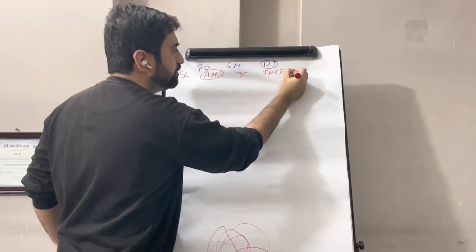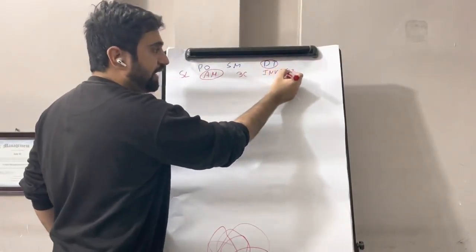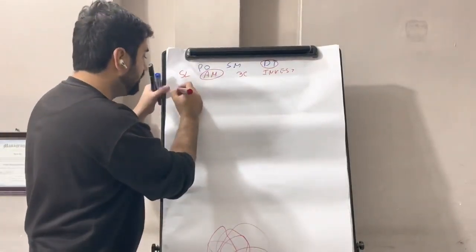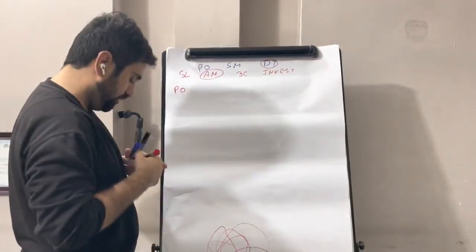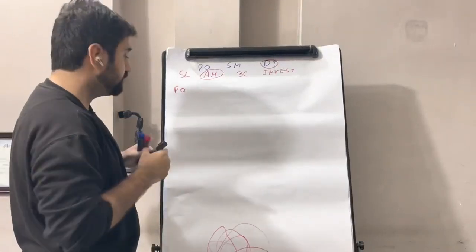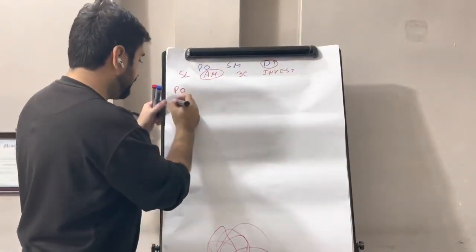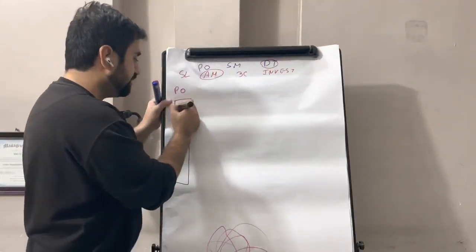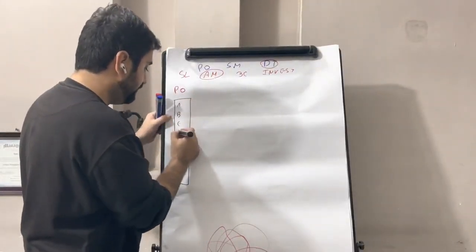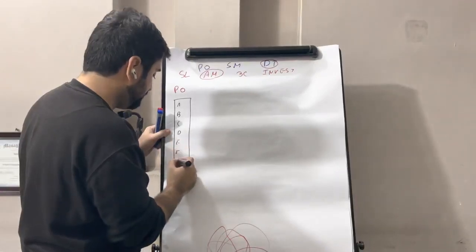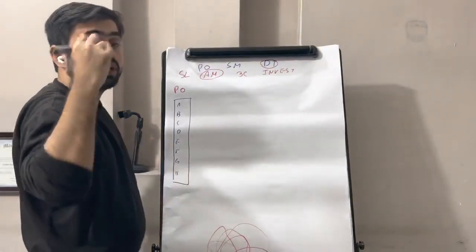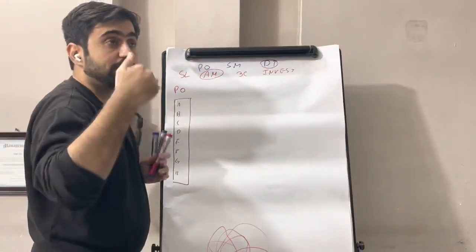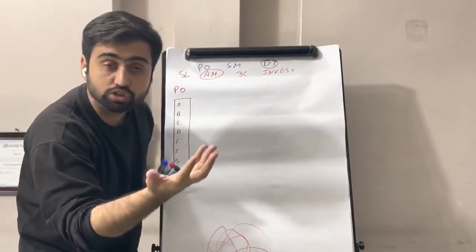All the user stories must be independent, negotiable, valuable, estimable, small, testable. The product owner basically gets all the user stories from the stakeholders, sponsor, and puts them into the product backlog. Okay, once all the user stories are there, A, B, C, D, E, F, G, H. He goes back to the sponsors and asks them, hey, why don't you rate the user stories high value, high risk using the MoSCoW technique?